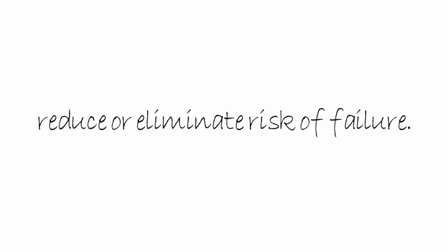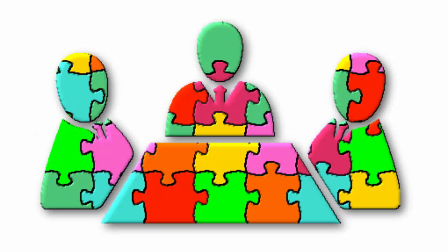They aim to eliminate problems by building in contingencies and reduce or eliminate any risk of failure. A prudent project manager will build in sufficient contingency to allow for the inevitable slippage that will occur, even if it is not the fault of the team, but results from, say, late delivery of parts, being let down by subcontractors, illness, or whatever. So both time and financial contingencies are often built in.